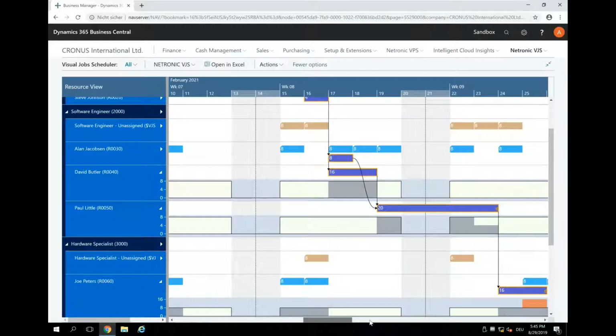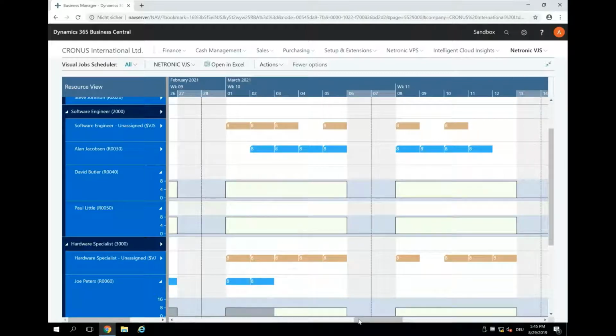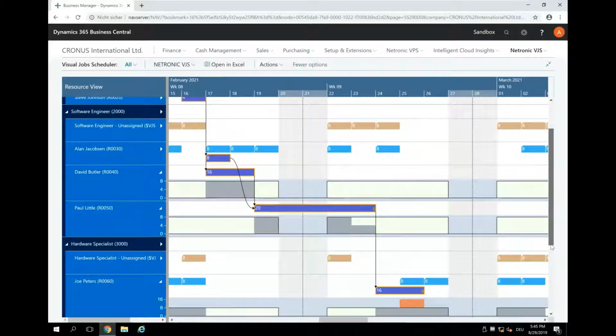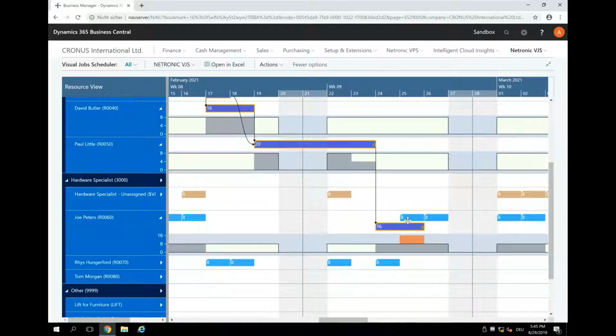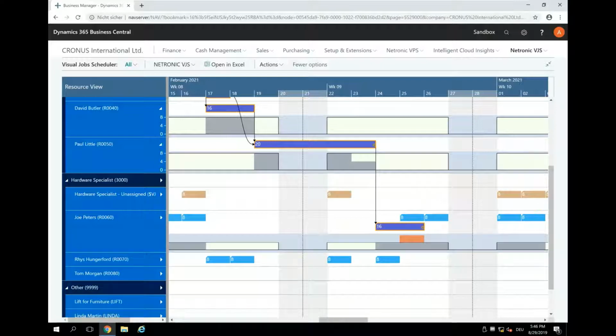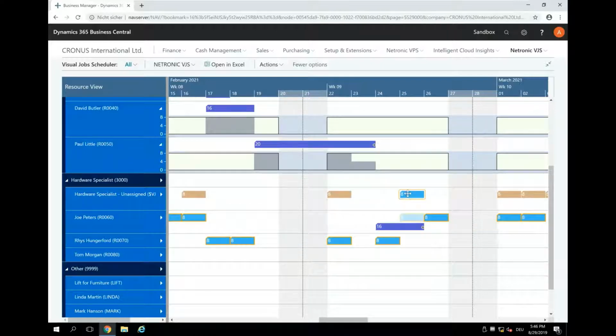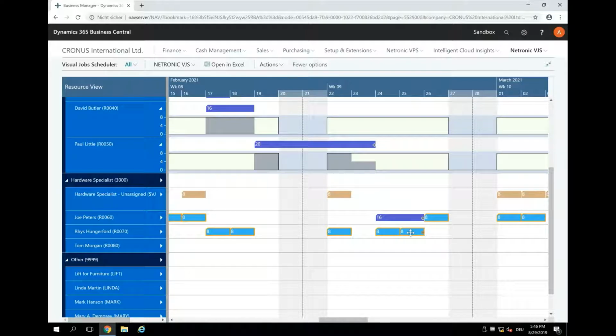And then we get to the next task and have these 16 hours here. And of course, this is still something that we need to figure out. Okay, we have an overlap here because we need Joe for those 2 tasks, but if Reese has some free capacity, we can move this to free up some time here. Yeah, now it's there.